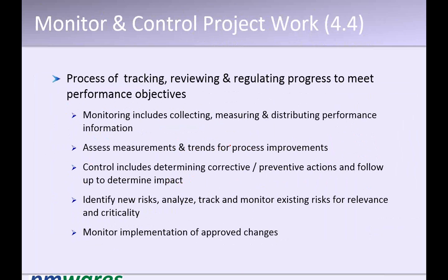And then the monitoring and control. Monitoring and control talks about: you have the plan, you have execution data. Now you compare and do variance analysis, and make corrective or preventive measures if there is a variance. In that case, you will see all the controlling processes come into the picture.